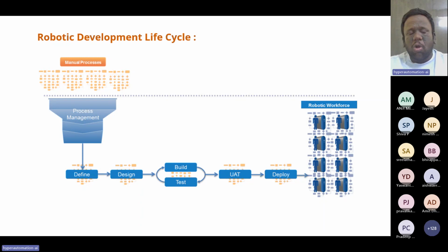Let's say I'm trying to automate a process and I have automated it without any PDD document. There is a loan approval process. During the initial requirement gathering, it was said that if your CIBIL score is greater than 600, you can approve. I developed my bot and it's in production, and they come up with a problem stating that the bot is approving applications for CIBIL scores less than 700. We can't fight with the client saying, earlier you said 600, but now you're saying 700, right?